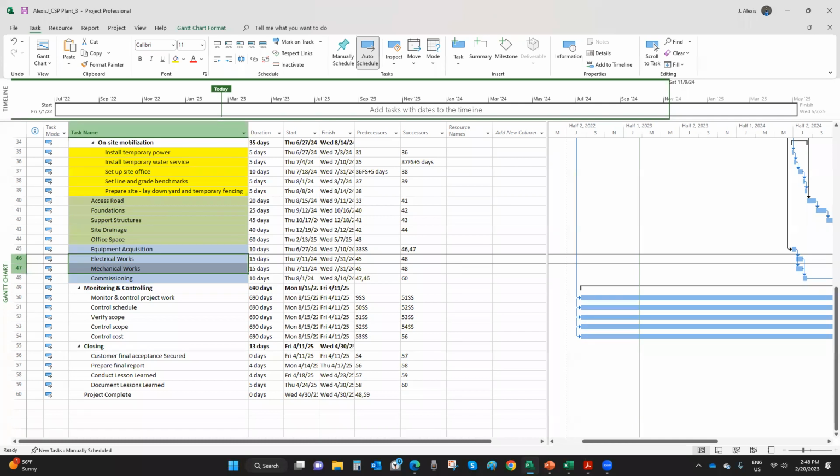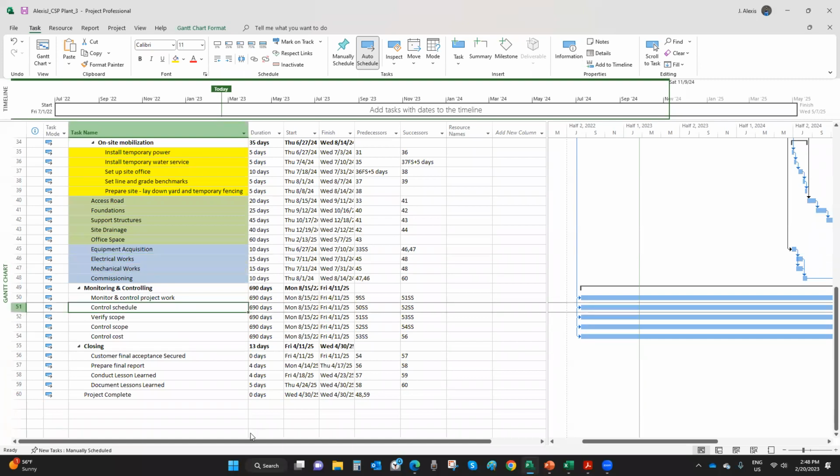But is it true that you have to finish the first one to finish the second one? Maybe not, right? Electrical and mechanical works may not be related, but if you need electricity to complete some of the mechanical work, that is true, then that would be something you do, and that would make sense, right? It has to make sense, whatever you do. Okay. Thank you. Cool. Any other hands here?